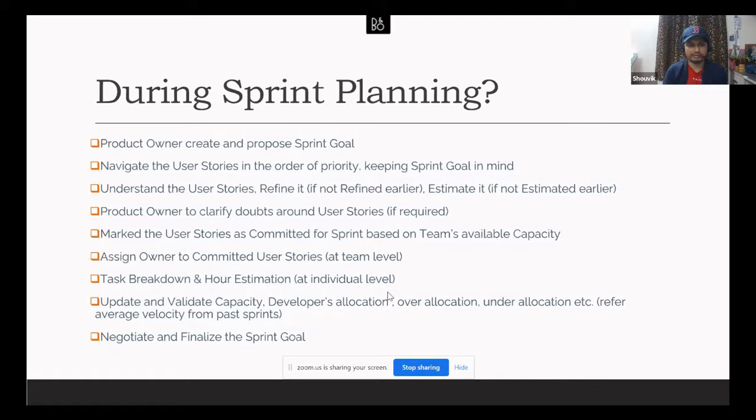So what all tasks are needed to complete that user story. One user story may need contribution from all the skills, maybe some contribution from a tester, from a developer, or maybe two developers. In Scrum we generally promote cross functional team members, but sometimes it doesn't happen on the ground. We try to keep a cross functional team where all the skills needed to deliver a story are present, right? So now we will break down the tasks, and the owner of the user story can be one person, but the tasks can be owned by multiple persons. So that is the idea here, right?